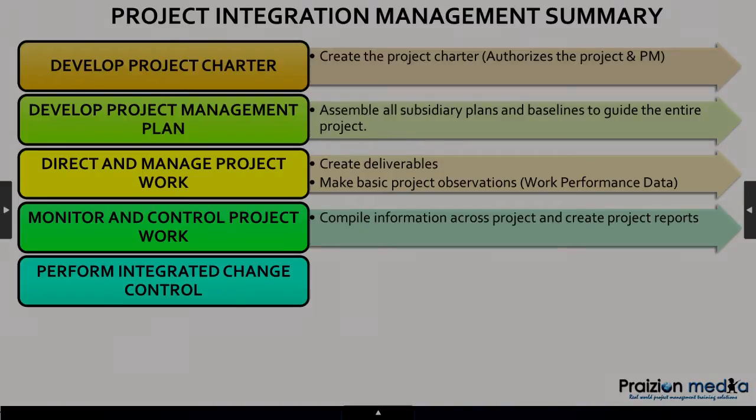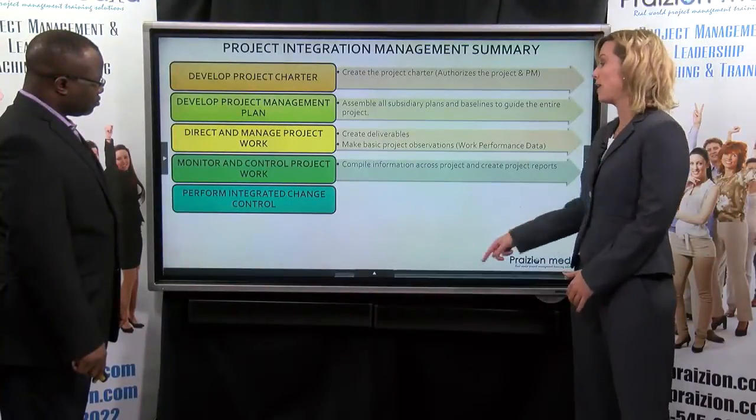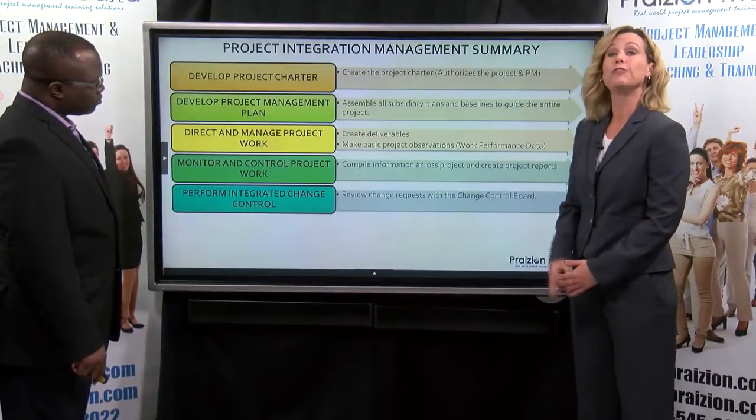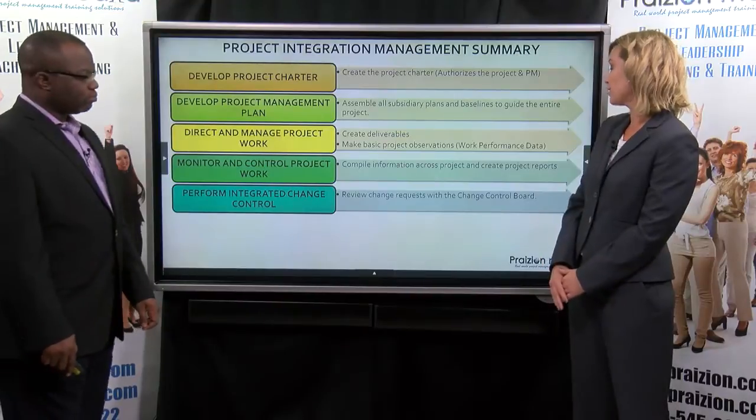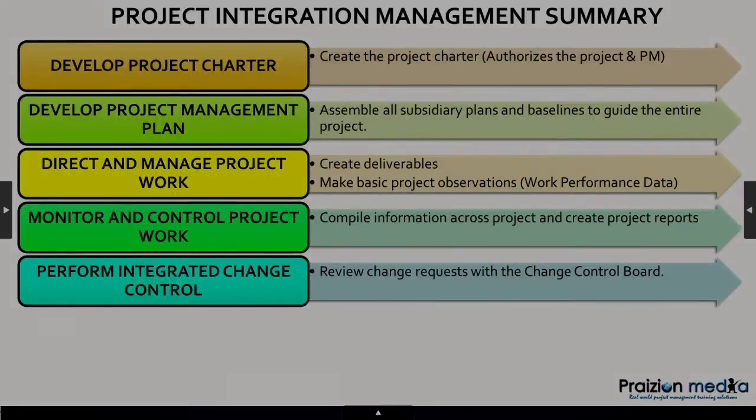Well, within monitoring and controlling, we have another process in integration. It's called Perform Integrated Change Control. And this is where all of our change requests go. And they're reviewed officially in this process with the Change Control Board, if you have one. And this is where the changes are accepted or rejected.